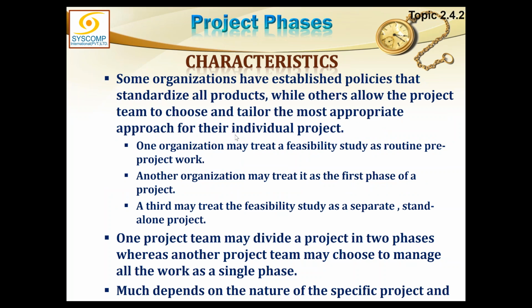Here we are talking that this depends on organization to organization, but some organizations have preset project life cycles. Why? Because they probably are doing a similar kind of job. For example, if it is a web development company and it only deals with web development projects, and all the web development projects do not have much variation, they are only doing static websites. So if all the projects they take are of static websites, then they have established their own project life cycle that every static website project will be divided into these 5 phases.